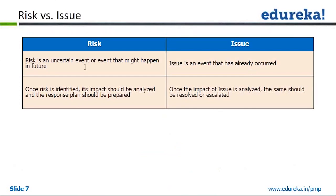Here is the difference: a risk is an uncertain event or condition that might happen in the future. An issue is an event that has already occurred. Once a risk is identified, its impact should be analyzed and a response plan should be prepared. Once the impact of an issue is analyzed, it should be resolved or escalated — there is no response plan for it. We are not loosely saying 'mitigate' here; we are saying 'response plan,' and there is a reason for that distinction.